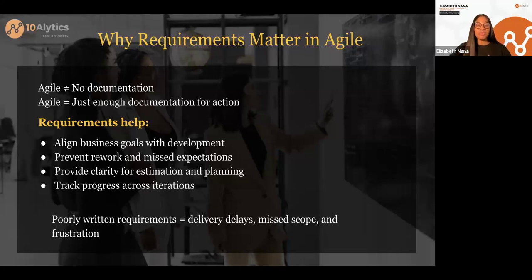So it's similar in project management. It's similar in handling a project as a business analyst, to prevent having to work on something, or maybe you've been working on something for the past 2 months, and later you find out that this is not what the stakeholders want. So what happens to all the work that has been done in the past 2 months? You have to go back and start afresh. So requirements help to prevent this rework and also missed expectations.